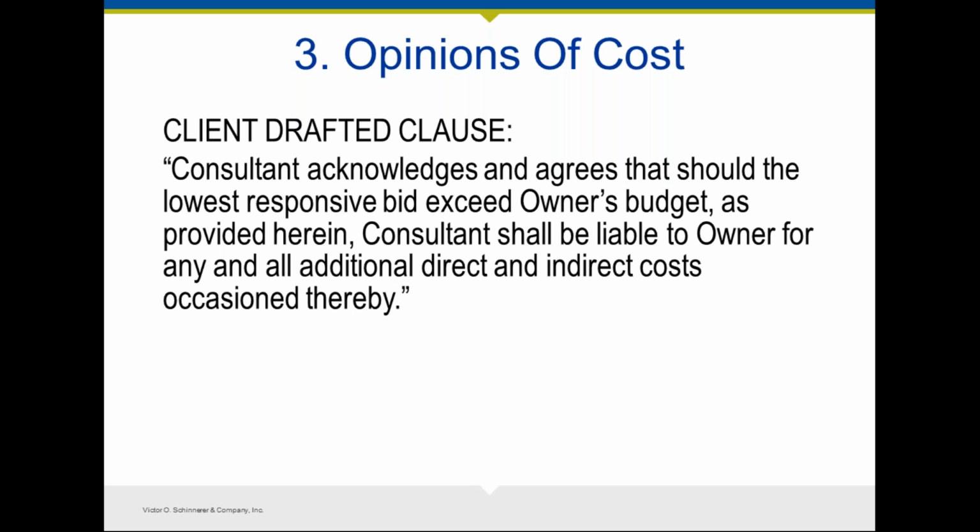If you are indeed providing cost estimates, a lot of times those are conceptual. You're going off of, this is how many linear feet of pipe we're putting in. We think this is how much it costs per foot, and you do a quantity takeoff, and based on that, you kind of give a conceptual cost estimate. That is not how the marketplace operates. There could be any number of things that affect how the bid is going to come in.